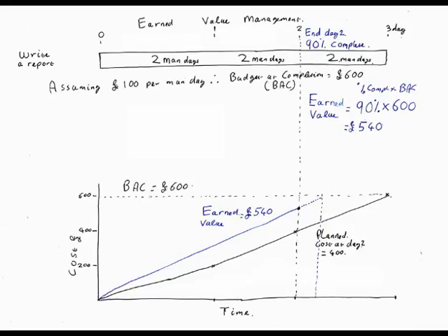And the earned value is valued as a consequence of how much you thought it was going to cost to make in the first place, and how much of it you now got. So I've earned 540 because I've done 90% of the work. This all comes down to your estimation of percent complete. That's one of the weaknesses of earned value, because it's very sensitive to that percentage.